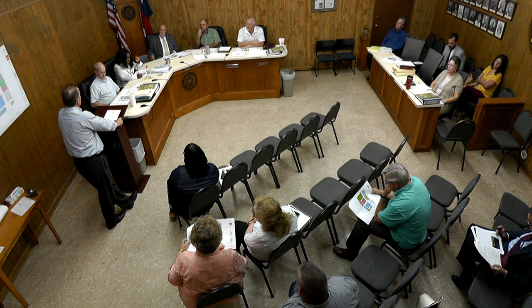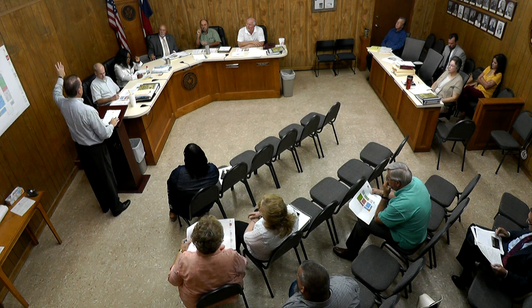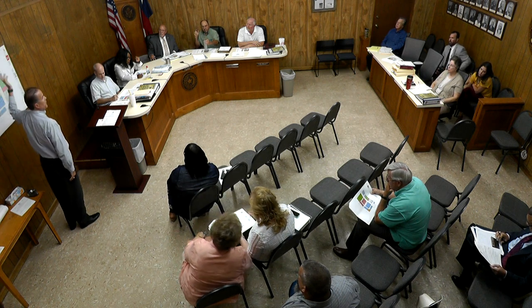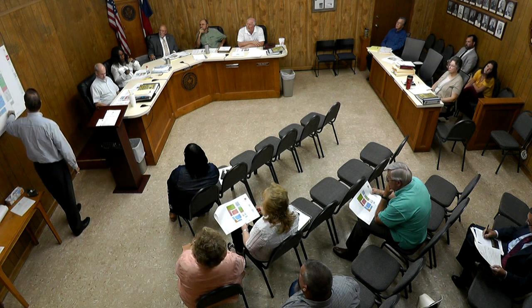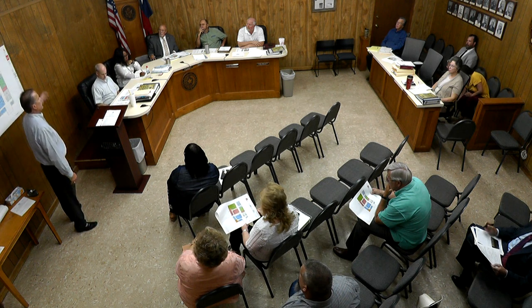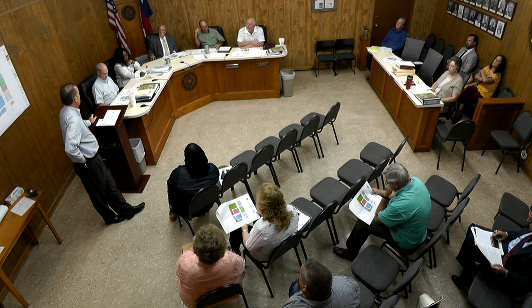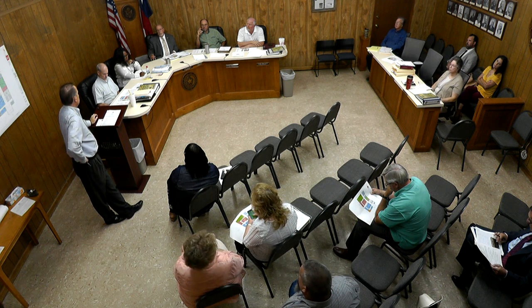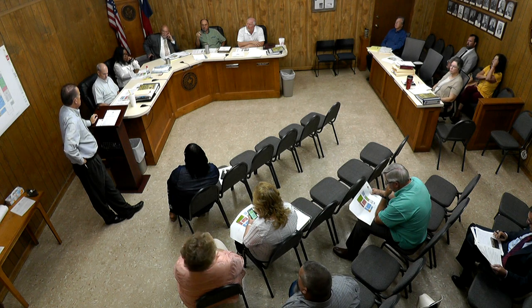Brick and some cast stone trim. On the majority of the public viewed sides. On a certain back facade here that is maybe not seen by anybody but the staff parking lot, we can go to metal panel and save some money there. But the predominant view, certainly from here all the way around to this corner, would be a masonry building, and we do a proper steel frame building with a flat roof. It would give us air-cooled chillers that are economical to operate, which is Al's preference. Is a flat roof a good roof for this world?